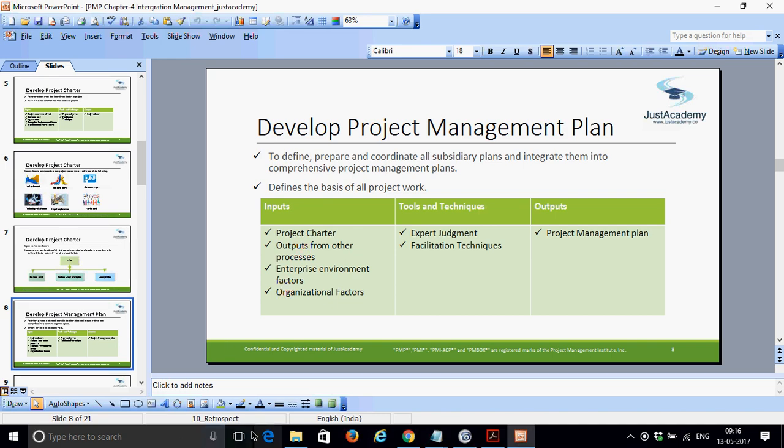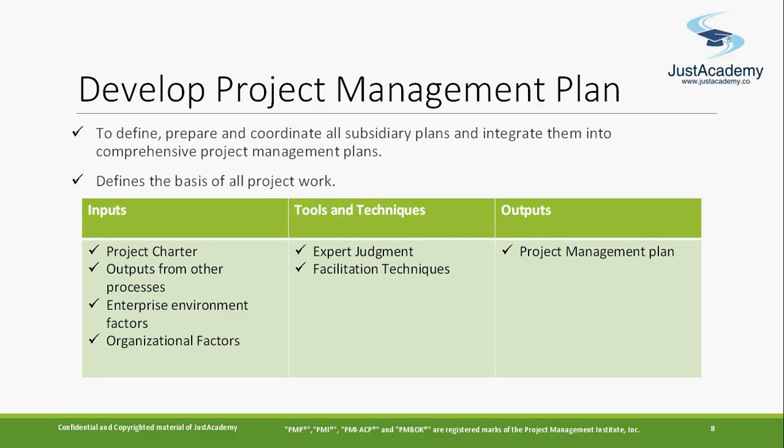Sorry to interrupt. On the expert judgment you mentioned, that means technical people's opinion, right? Probably the timelines of each component to be developed. Am I right? So it is like a team lead? Mostly team lead or subject matter expert, they give you their opinion on what will be the time required to do it. You don't go into much detail, because when you go to schedule management or cost management, you go into much more detail. But on a high level, they can tell you this is like 1 month or 2 months or 3 weeks. That's what's required, right? Okay.